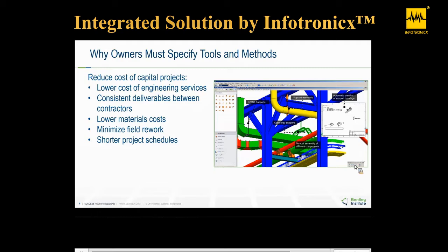And in today's joint venture and design build scenarios, it's common for multiple contractors to contribute to a plant modification. In this way, a consistent set of design information contributes to the shortest schedule and the lowest cost. In such a situation, common material specs and reporting formats across all the contractors allow for material requirements to be procured at the lowest possible cost. And reporting on long lead items earlier in the design process shortens schedules and lowers material costs.